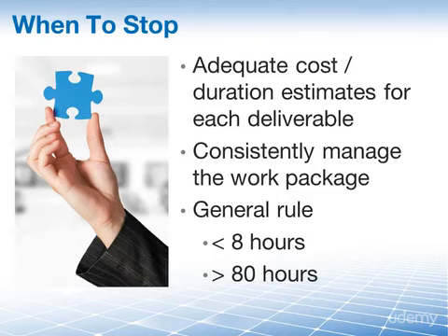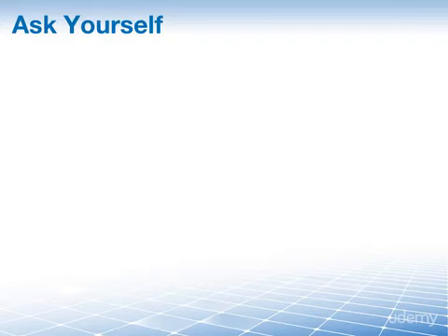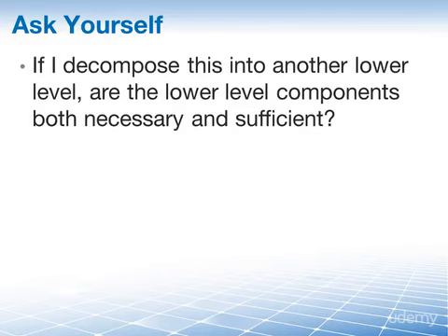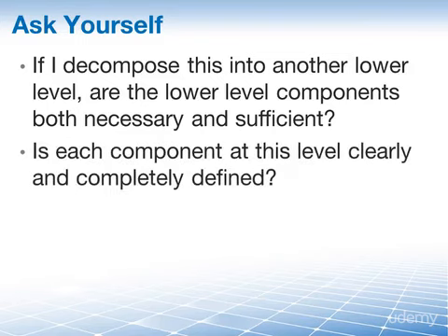hours of effort. And if that still isn't good enough for you in regards to knowing when to stop, then ask yourself the following questions. If I decompose this particular package here another level, are the lower level components both necessary and are they sufficient? Ask yourself also, is each component at this level where I'm currently at clearly and completely defined?